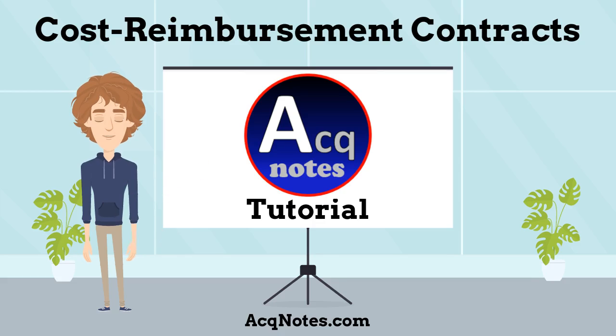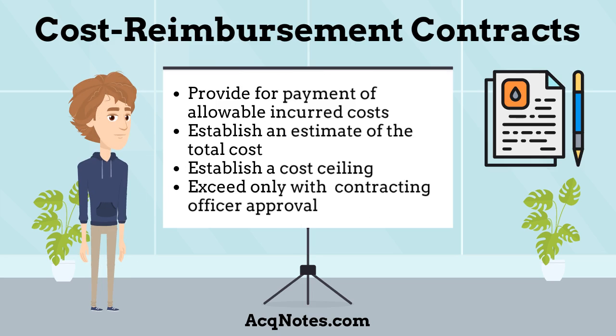My name is Matt, I am a contracting officer, and I am going to give you a quick tutorial on cost reimbursement contracts. What are cost reimbursement contracts? Cost reimbursement contracts provide for payment of allowable incurred costs, to the extent prescribed in the contract.